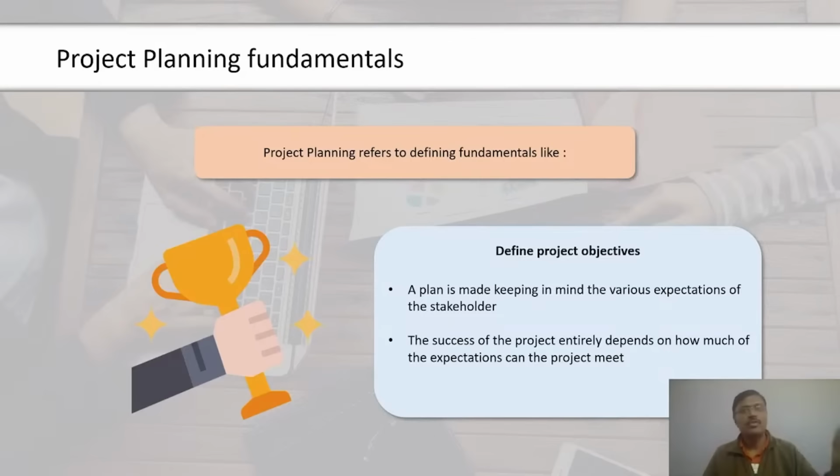The other way of classifying life cycles is how they go about the process of planning. In predictive life cycles, there is a large upfront planning phase, where all the details of scope, cost, time are planned before beginning the subsequent phases. These phases then are executed in either sequential or overlapping modes. They are suitable for large projects where all the requirements are likely to be known in advance and where upfront planning effort is required to get the necessary approvals.